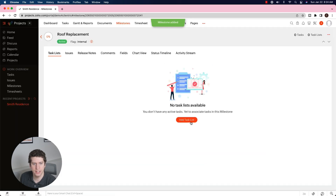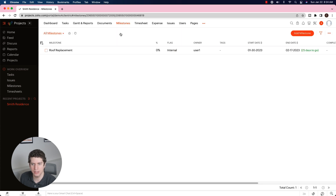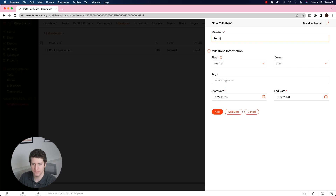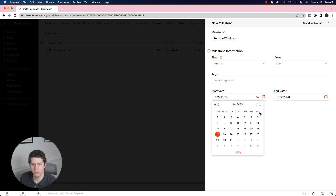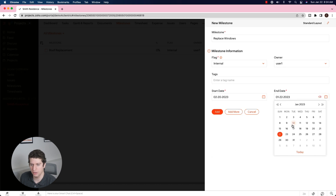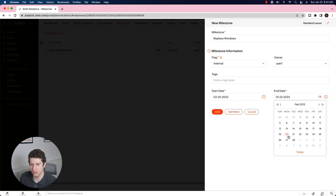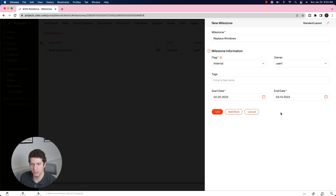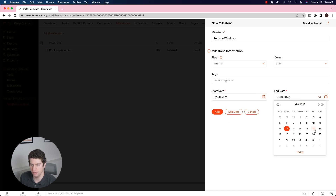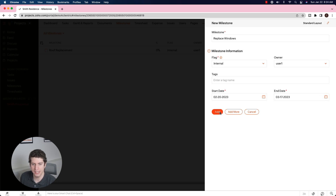We also want to add another milestone — 'Replace Windows,' which is an additional service the client is wanting. This one will really only start after February 17th, so we're going to start it on the 20th. That one could take four to six weeks depending on how long it takes to get the windows in, so we'll set the end date to March 17th — about four weeks. Clicking add.